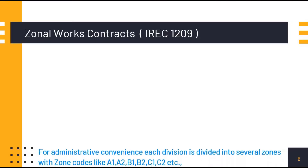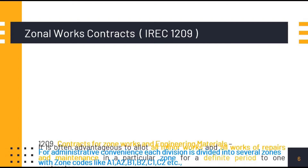Indian Railway Engineering Code Para 1209 explains about the Zonal Works Contracts. For administrative convenience, each division is divided into several zones with zone codes like A1, A2, B1, B2, C1, C2, etc.